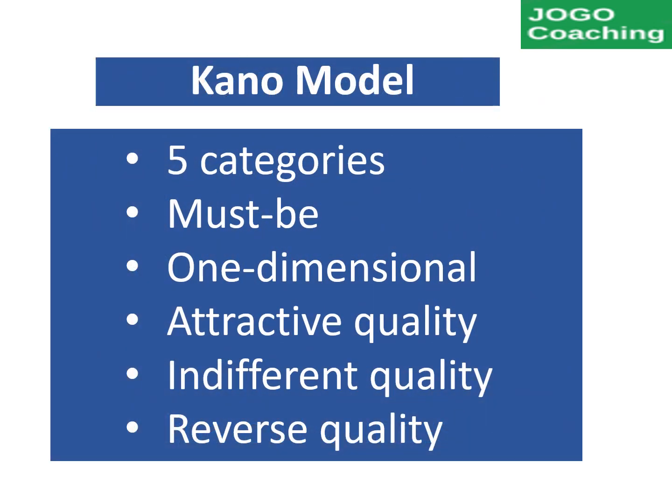The next technique is Kano model prioritization. The prioritization will be done based on the customer's preference of the user stories. Five categories will be assigned to each user story in the backlog. The first category is must-be: the user must be satisfied with this feature. The second category is one-dimensional quality: users are satisfied if the feature is present and dissatisfied if not. The third category is attractive quality: users are happy if the feature is present but won't be dissatisfied if not. The fourth category is indifferent quality: users won't consider a feature either good or bad. The fifth category is reverse quality: users are outright dissatisfied with the feature. This approach is used when many competitors are in the market for the same product.